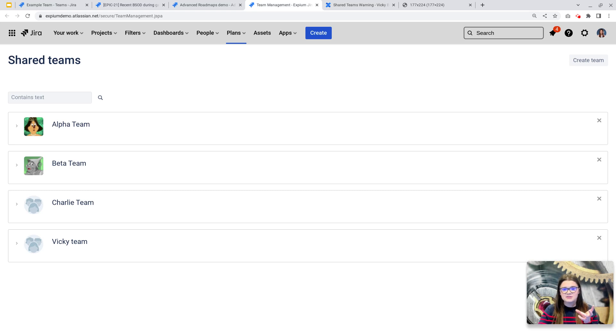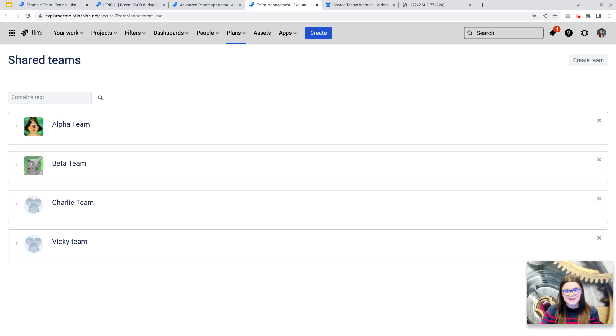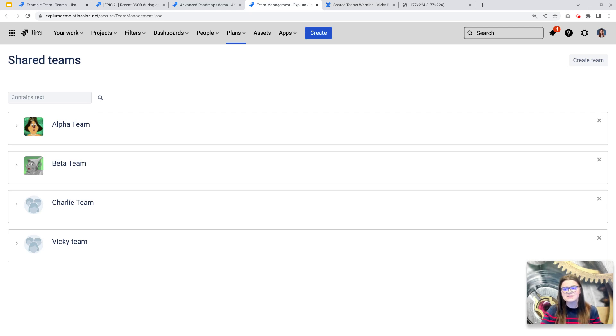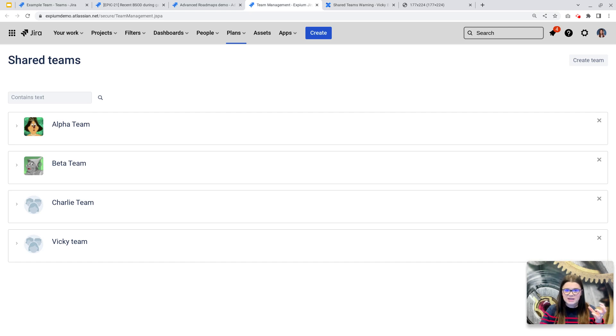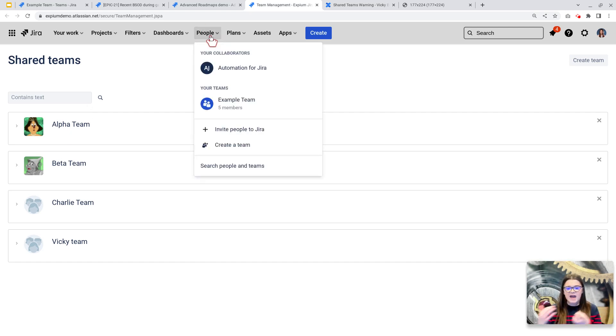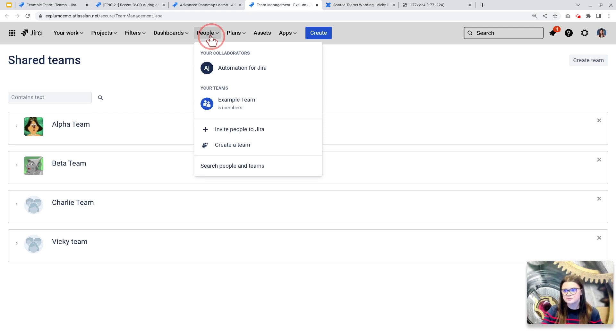So in an effort to not remove that data, but instead retain it, really your best path is to keep your advanced roadmap shared teams, deprecate or update any of your duplicate teams that are a Jira or people team here, and then just add those members to the appropriate shared team going forward.